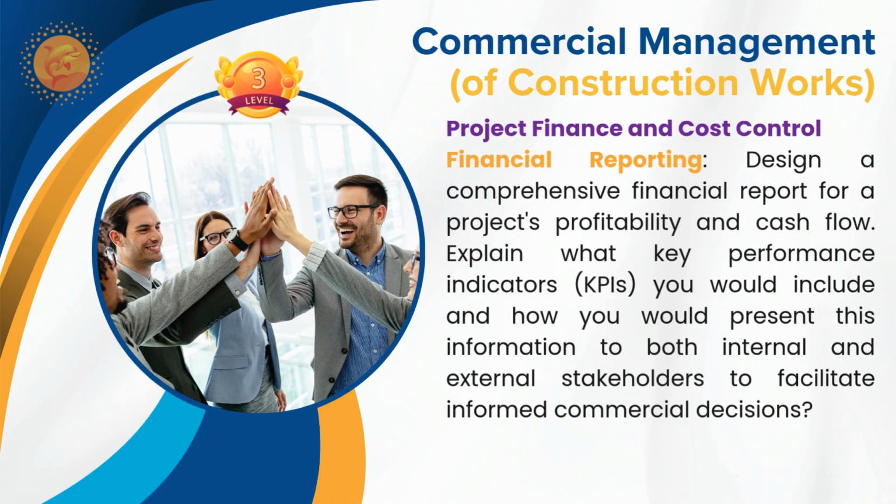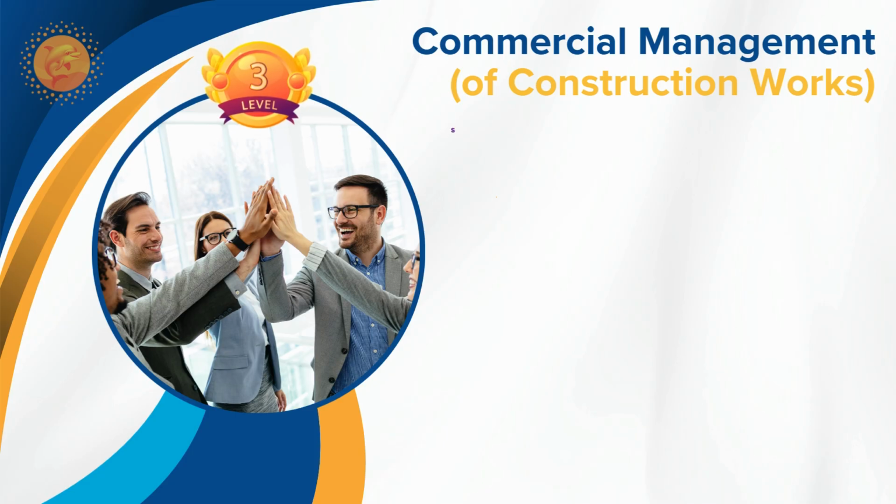You have to make sure it has been clearly cost coded and allocated to the respective cost sources. Then only will each element reflect exactly what cost performance it represents. That is what is important. Then only will you be able to clearly advise your management on the course of action necessary to maintain the profitability.